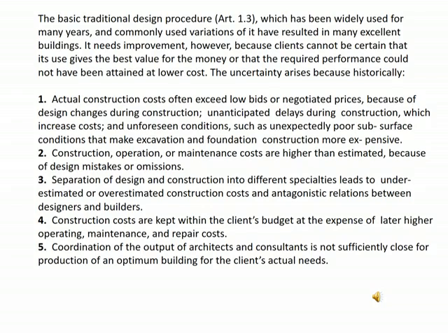The separation of the design and the construction into different specialties leads to underestimated and overestimated construction costs, and poor relations between the designer and the builder. So sometimes there is a separation of design and construction. The design is done by the designer, but the building is constructed by the builder. So at times the designer and the builder make different assumptions. In this case, they will interpret differently, so it will also cause overestimated construction costs.